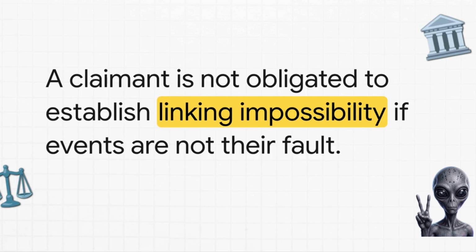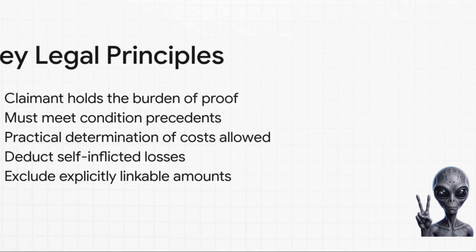Heck, even if the contractor's own shoddy record-keeping created the mess, they can still potentially win if they successfully meet the burden of proof on the balance of probabilities. That being said, the Walter Lilly case is definitely not a free pass to just submit a messy, aggregated invoice. The strict legal principles still absolutely apply.